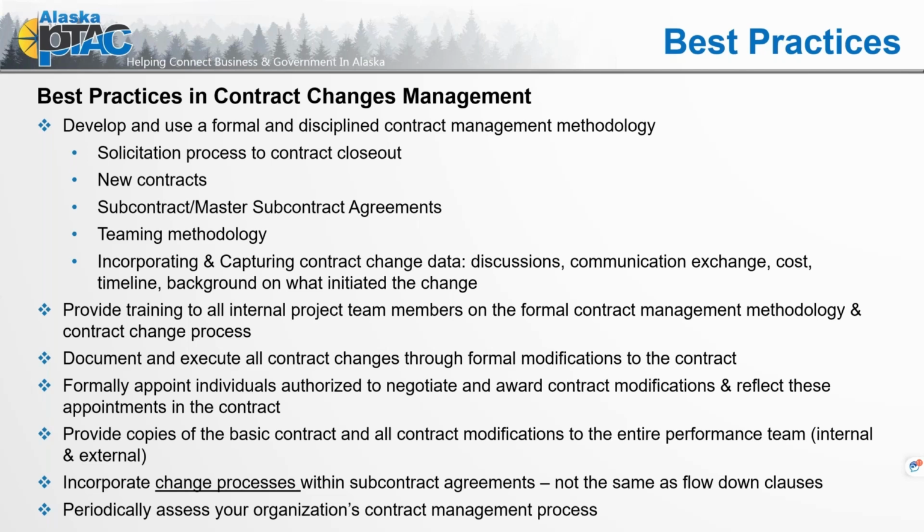If we are identifying those individuals, or those individuals change throughout the performance of the contract, just like the contracting officer, if they change out a COR, there should be a new designation letter. So if the individuals with that authority to negotiate and change are different, you should let the contracting officer know. And have a process for identifying who internally has that responsibility. If you have one main project manager and they're on vacation or simply unavailable for whatever reason, there should be some sort of hierarchy of authority in place to be able to step in.